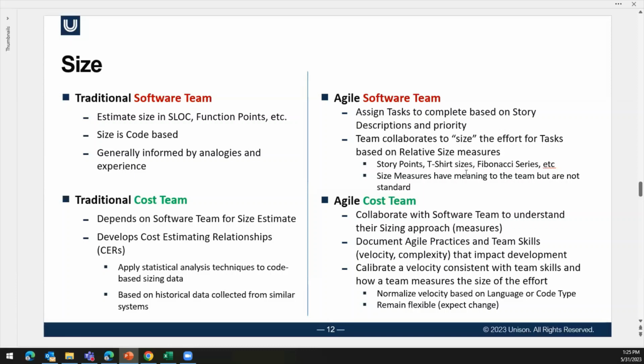And so the software teams, within the scope of their increments, whatever they are, sprints or however long they last, are beginning to say with their teams, go to the Scrum Master. Well, that particular type of data table, I'm able to do those in 3 hours, or that's a size 5 data table for me, or a size 1, or something that has meaning to them. That's the key. It has meaning to that software team in the room where they're working.